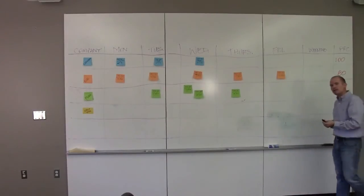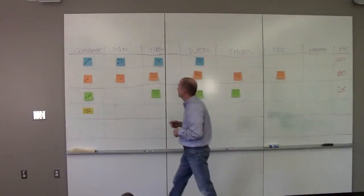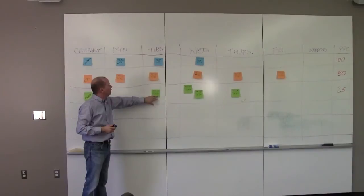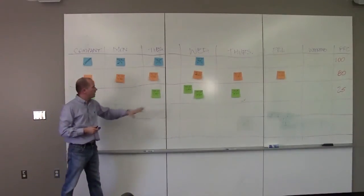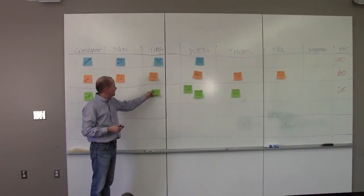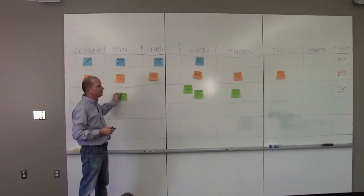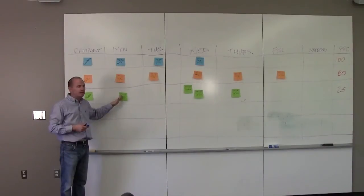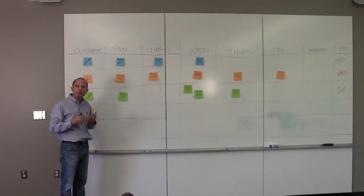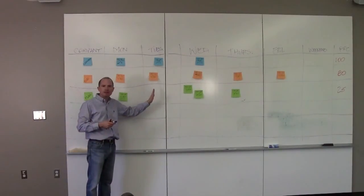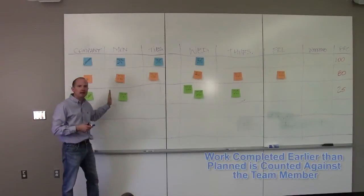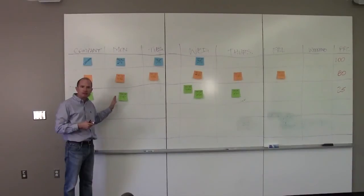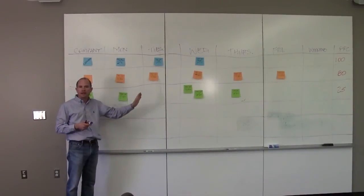Now let's change it up a bit. Let's say they said they were going to be doing the Southwest Quad on Tuesday. And they got it done. But let's say they actually got it done on Monday. This still counts as a zero. And this would count against their percent plan complete. And the reason why is you're trying to get them to become as predictable as possible. Because many times work performed earlier than planned can mess up the schedule as much as work that is performed late.